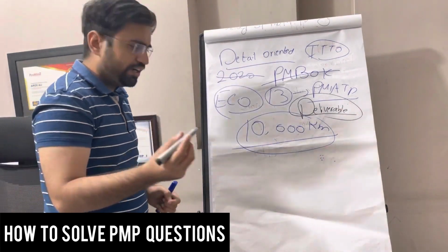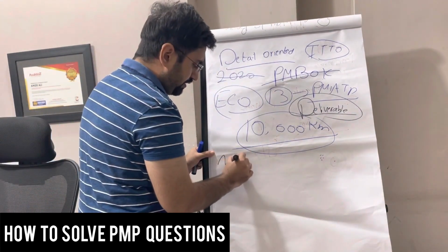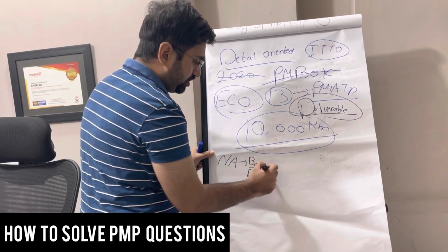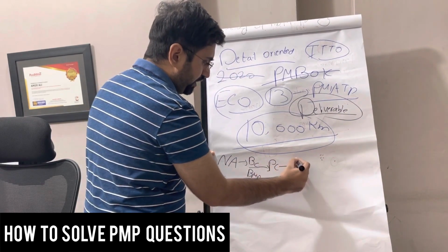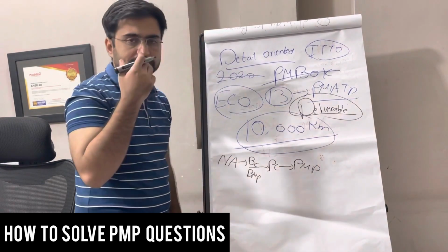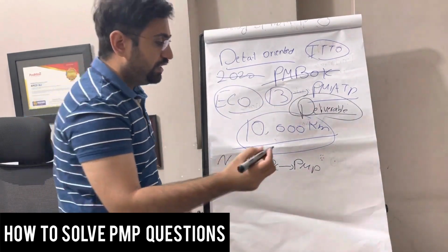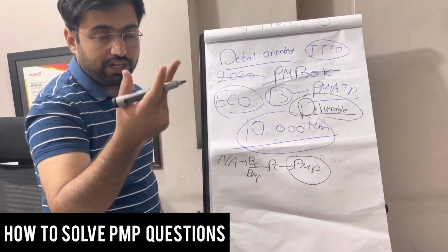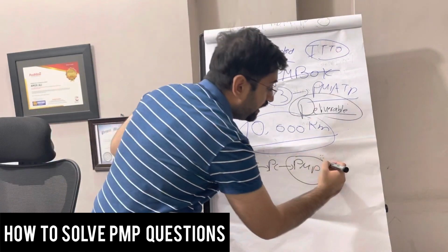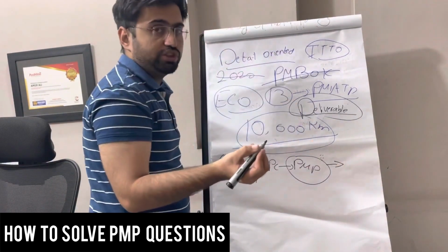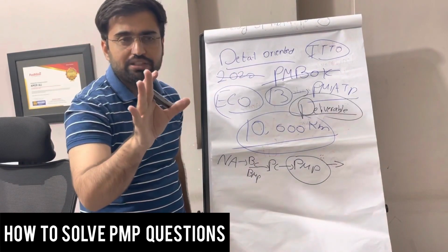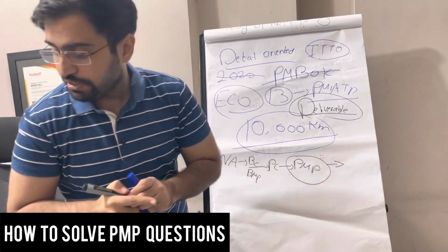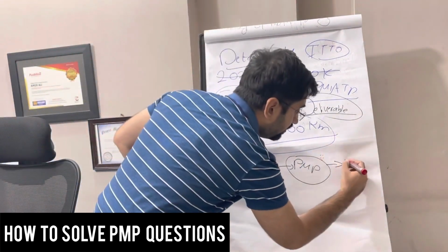So we get the business case, needs assessment, from needs assessment to business case, benefit management plan, then charter, then finally the project management plan is created. So we know how all these things are created. Once the plan is created, the plan must get approved from the relevant stakeholder or sponsor. When that is done, we start doing execution, also known as direct and manage work. So in execution, what do we do? When we work, we actually produce the real thing, and that is deliverables.